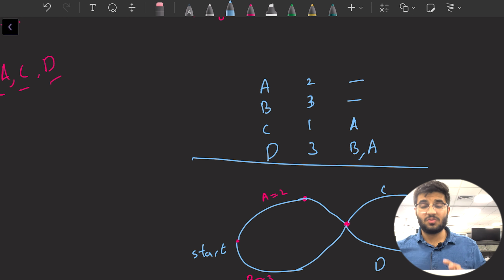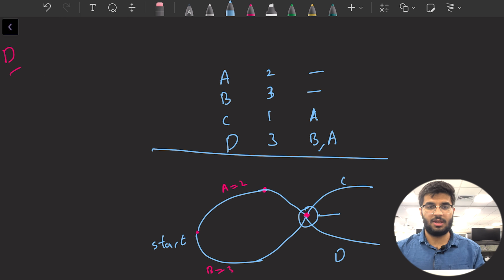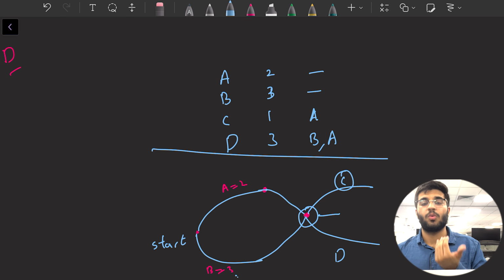Okay, now this is one way to go about it, but the problem is this way is wrong, and the reason is because this state is one where we have finished A and B, because those are the two ending up on this node, right? So this is that state, but this also says that for C, B is also a prerequisite, which is not the case. That's what you would read here, that B is a prerequisite for C, which is incorrect.